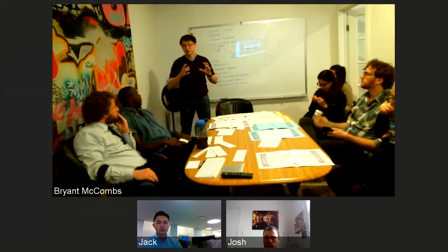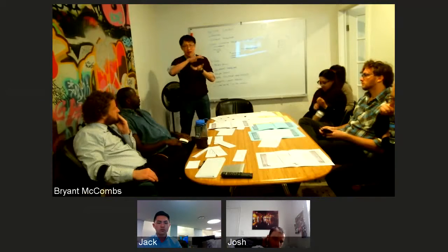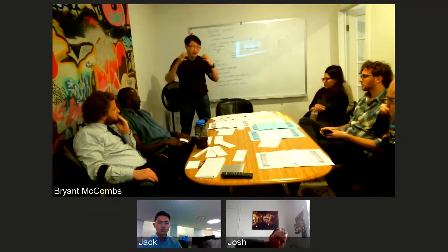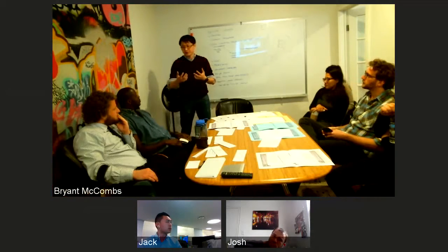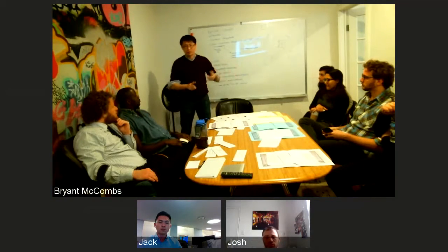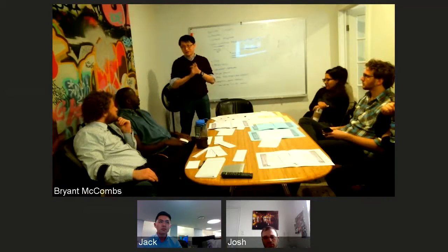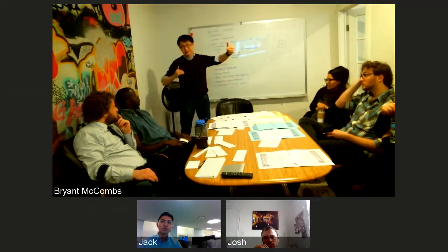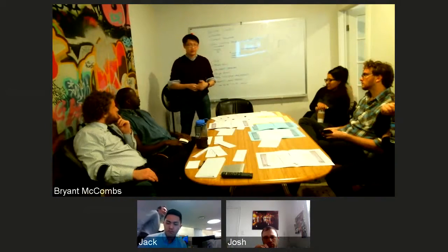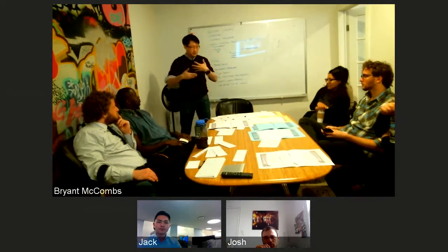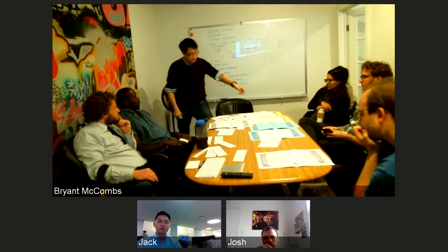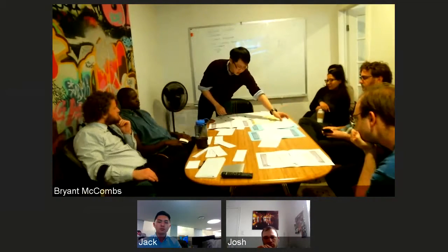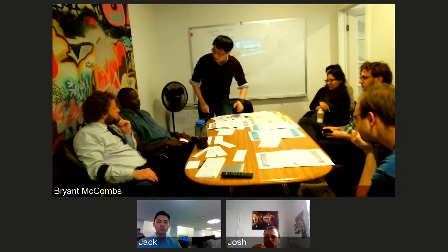You want to write your stories so that they're individually encapsulated pieces of work. And if you have hard dependencies, then you have to be able to express those in a way that says, okay, if you want to play this feature without playing these two other features, then the estimate is this big. But if you play these two other features, then the estimate shrinks. For example, if this one depended on these two, and you played it this way, maybe this is no longer a 32-hour estimate.